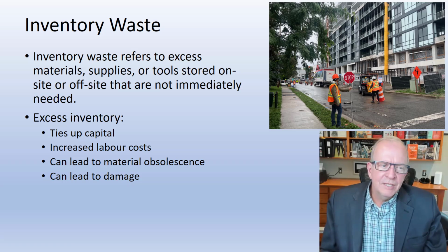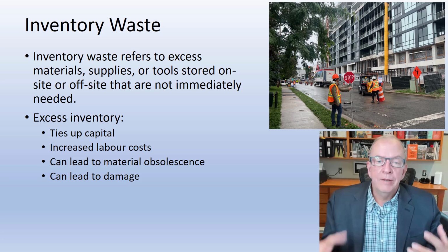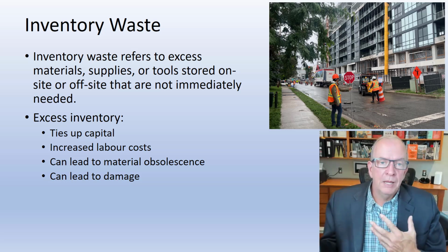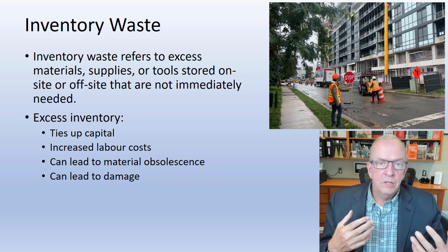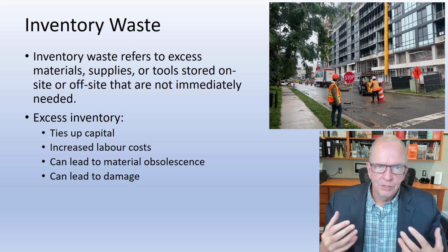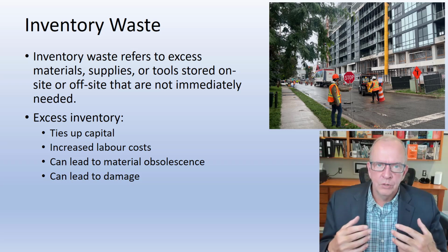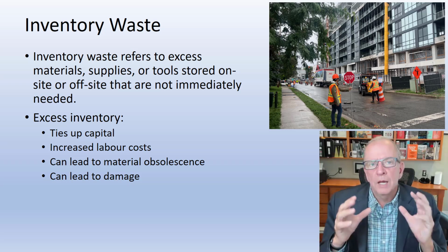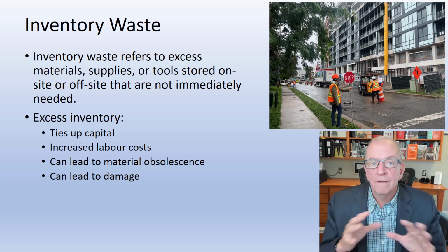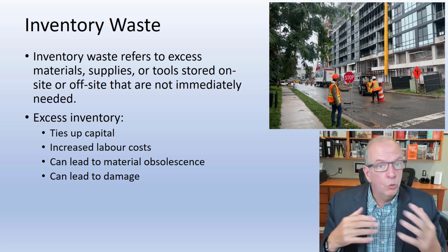There's a whole bunch of things that happen when we think about if we have too much inventory on site, right? So first off, it may tie up capital because you're paying to get this material delivered, and you may or may not be able to bill for it depending on your contract requirements and progress payments, etc. So that has the potential to tie up a company's capital, and everybody has a finite amount of liquidity, right?